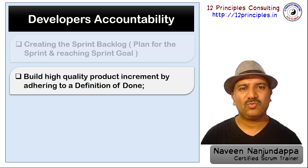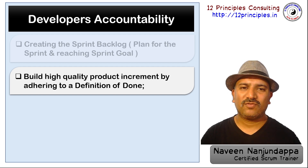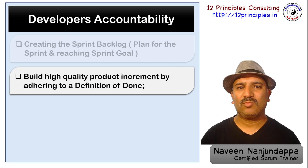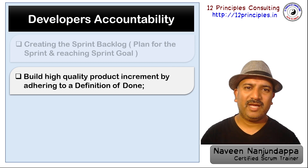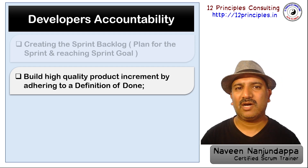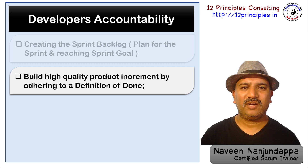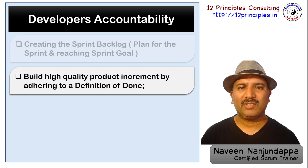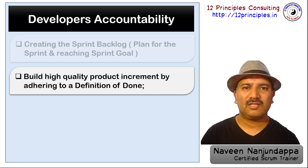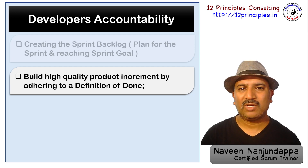The team members are focused towards building a high quality product increment by adhering to the definition of done. The definition of done evolves over a period of time and becomes more stringent, and hence the quality of the product also becomes much higher over time. It is important that everybody adheres to the definition of done and focuses towards building a product increment that meets the done criteria, rather than adding the number of functionalities without having the done criteria met.